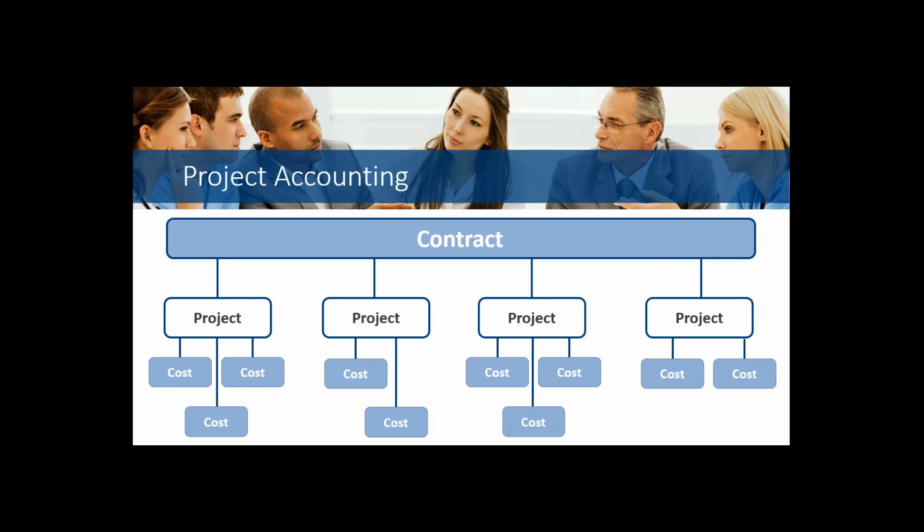For example, some clients want a cost group called travel. Any travel expenses go to that one group, regardless of what type of expense it is. Other clients may want to look at their travel in a little more granular nature. So they would create a cost group for airfare, lodging, auto, meals.